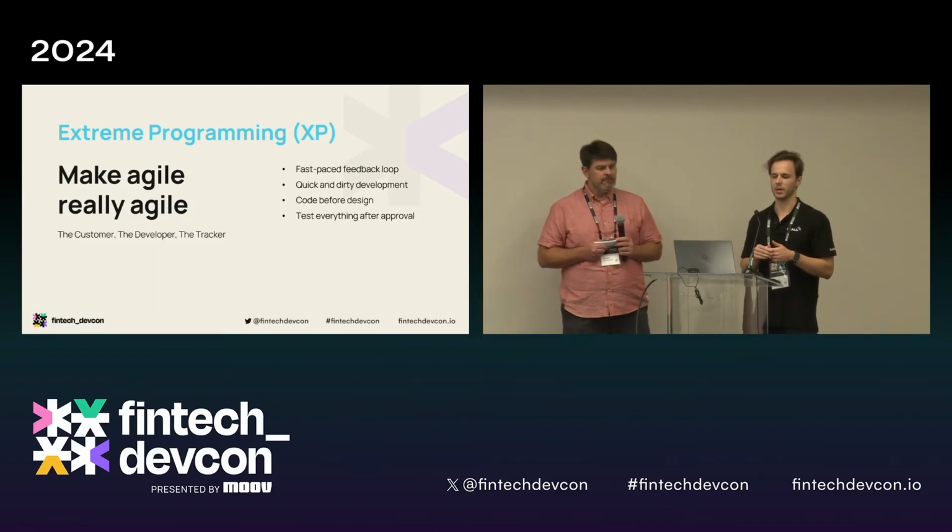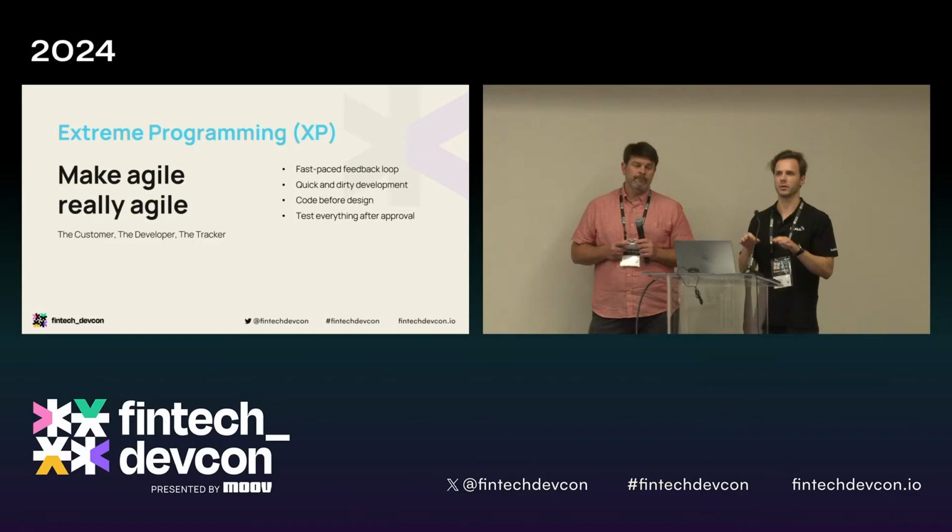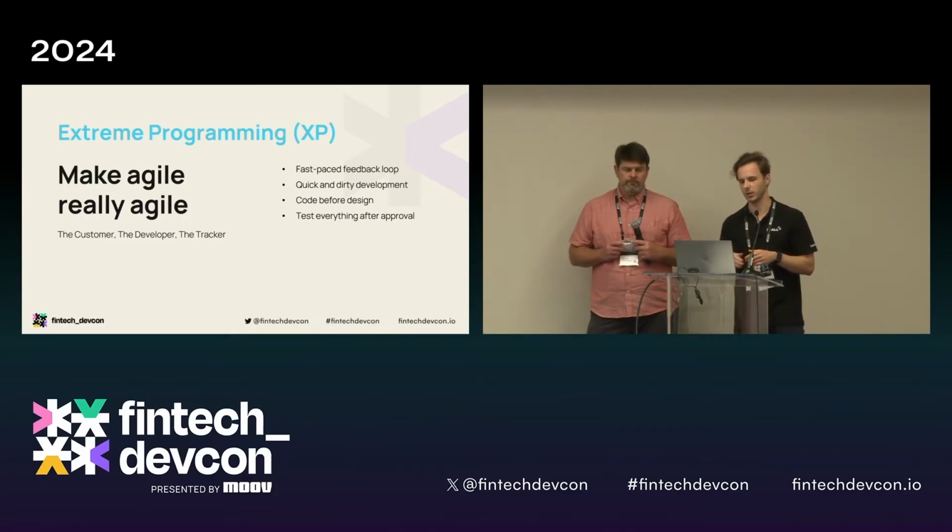So for example, for extreme programming to achieve the demos every 2 or 3 days, it's important that it often involves pair programming. That makes sure that the developers focus only on very small pieces of code for a day or 2, and they get them ready and demo them to the customer, instead of multiple developers working on their features and being stuck for, for example, 3 or 4 days before they reach out for help or demo their part of the code.